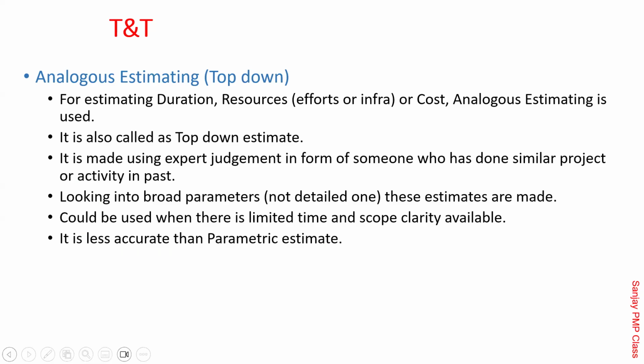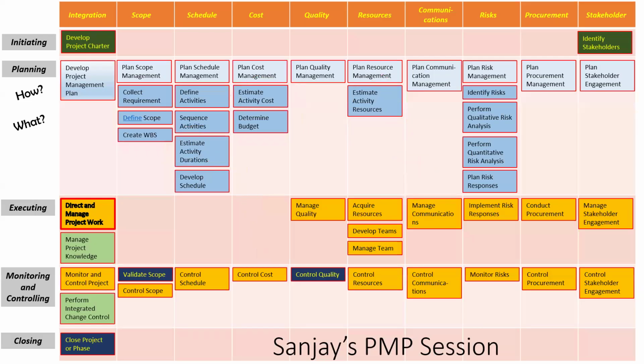Yeah. Now let's understand the linkages as well. Linkages-wise, typically resources and duration are done hand in hand in the project always. Correct? Yeah. Now, once this is done, using the resource estimate, the cost estimates are done. Are you getting it? These three are also linked to each other.